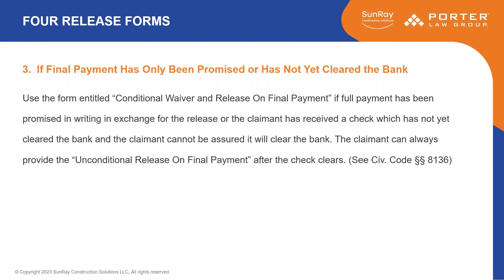Checks can be stopped payment on, and even if you deposit a check and think it's cleared the bank, if someone who wrote the check calls the bank and says it was fraudulent, they can reverse it and have it come back out. So sometimes you have to check with your bank and ask them: has the check irrevocably cleared the bank? Also, wire transfers can be reversed within a certain amount of time if someone claims fraud. The bank will reverse it unless too much time has passed, so check with your bank on that policy.